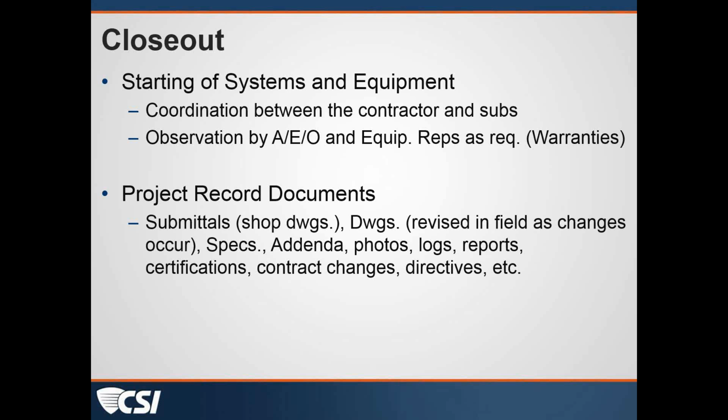Okay, great. Doug just spoke about the record drawings, and I've seen several architects actually put in their supplementary general conditions that there would be a review of those field set of drawings for each primary contractor at the same time that the pay applications are being reviewed, either in draft form or pencil form, so that it was directly tied to the processing of their next application for payment, that those documents be up to date.